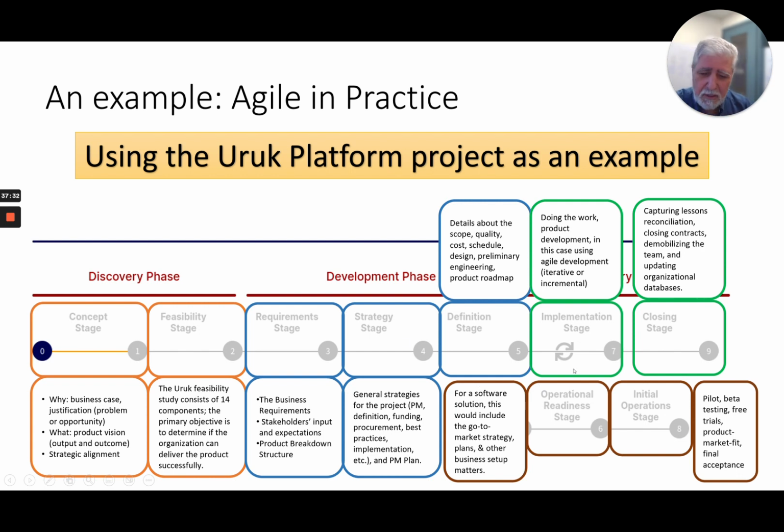In this case, we are dividing the increments in marketing into, for example, web, social media, and email marketing. We're treating each one of those pieces as an increment, because each piece is somewhat independent of the other, and they all link to each other in a way. We are using the same principle on a marketing project. We've used the same principle on participating in the PMI Global Summit to exhibit there. Obviously, in those situations, the projects are much simpler and much shorter, and of course, in those cases, we combine some of these stages, but that is the principle of adaptive, competent project management.